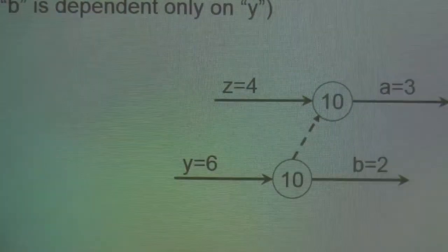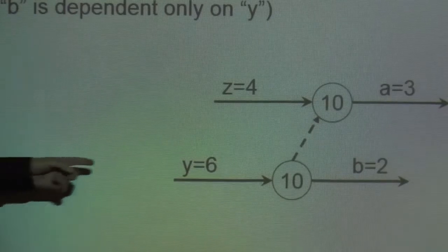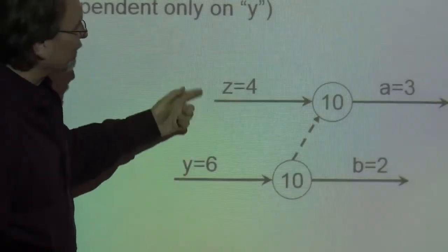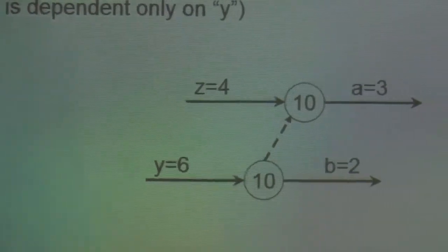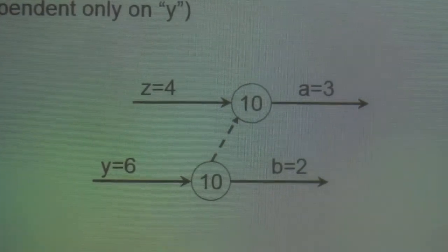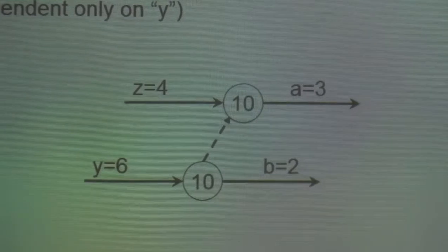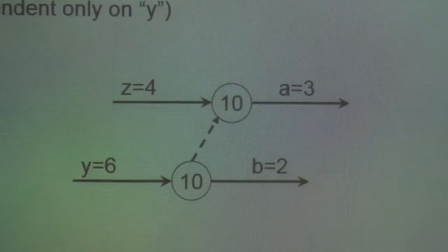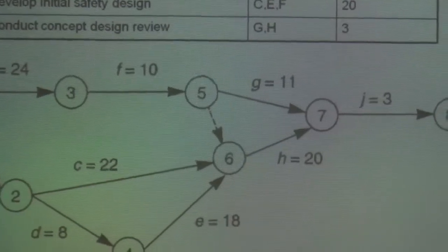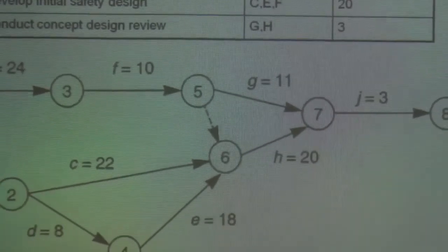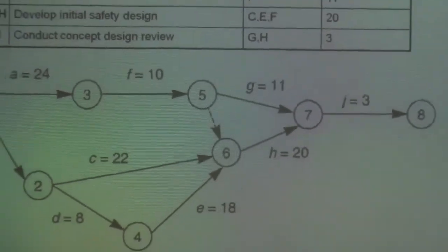However, they both have to be complete. So it's not a predecessor, but it has to be complete. It's a subtle difference, but nevertheless important. And it indicates dependency, although it doesn't have any time associated with it, the dummy activity.